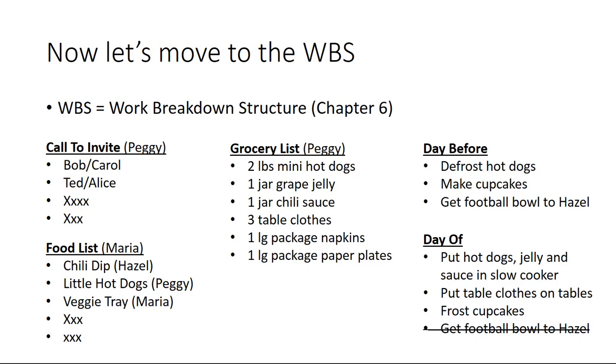And with the work breakdown structure, your goal is to get everything down that you want to be able to make sure that you cover for your project, no matter what it is. If you were, I have a student working on this, moving a warehouse, you want to be able to code each one of the items so that you can make sure that they get from where they need to be to the specific place they need to be in the new warehouse.